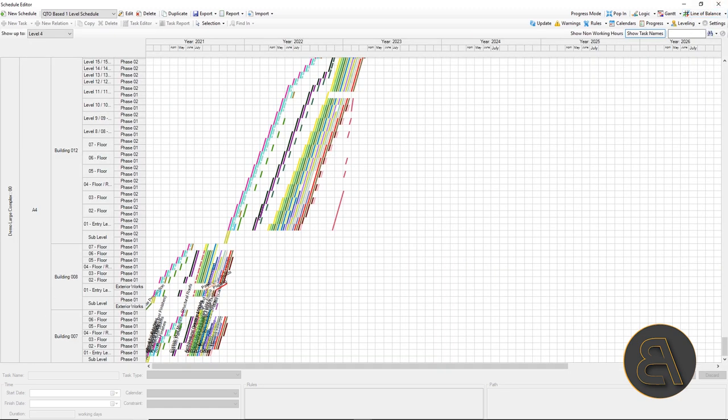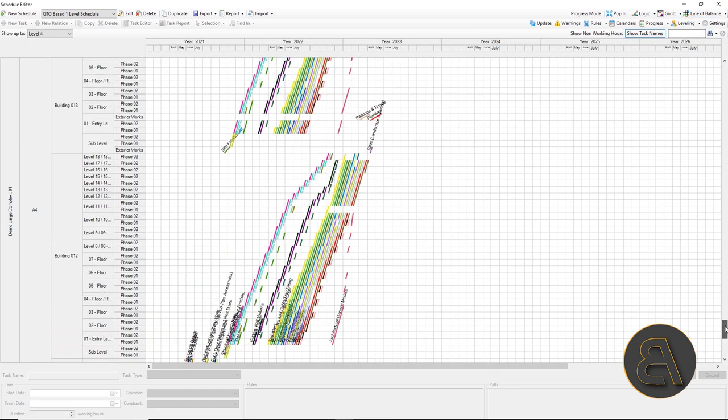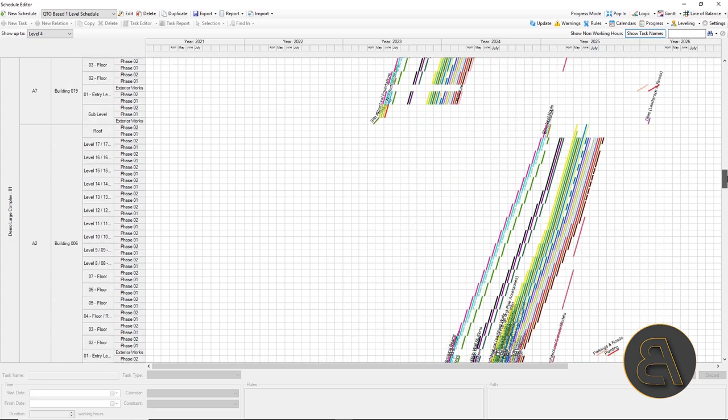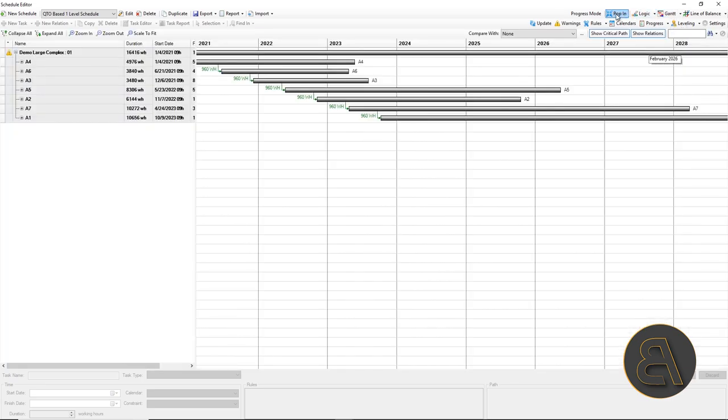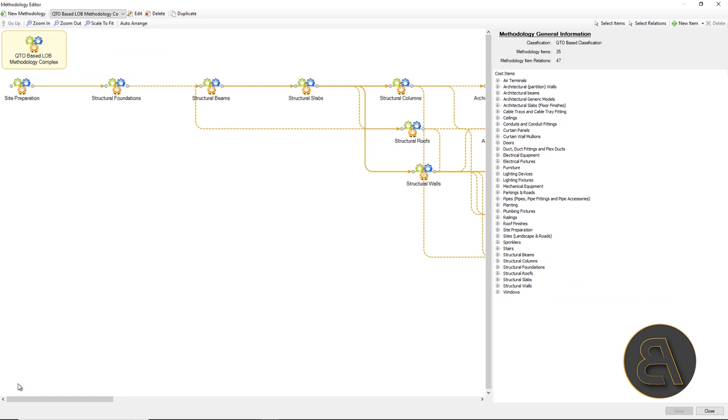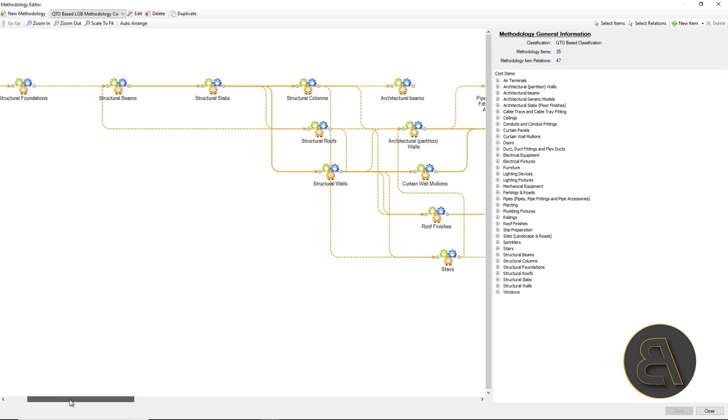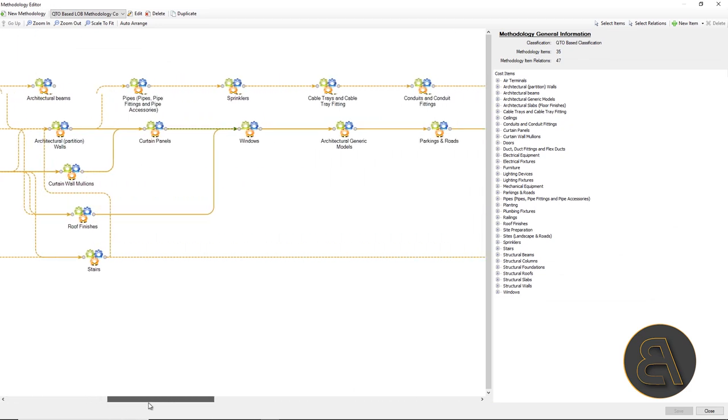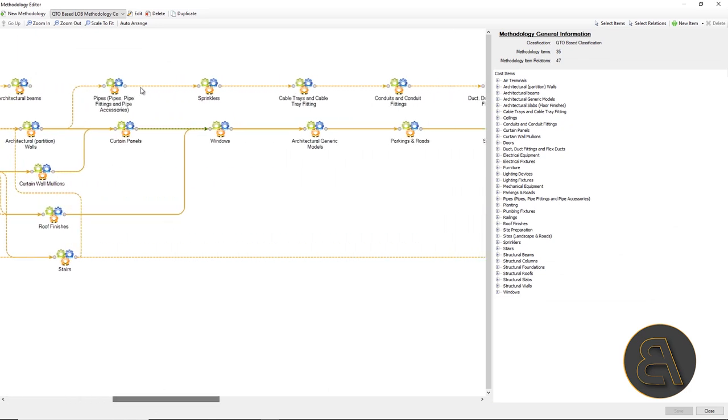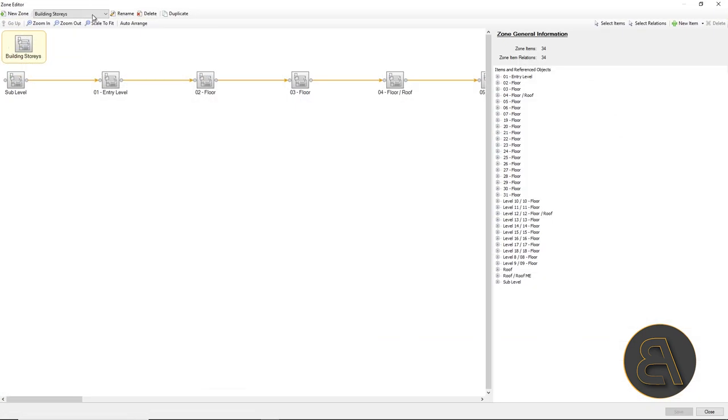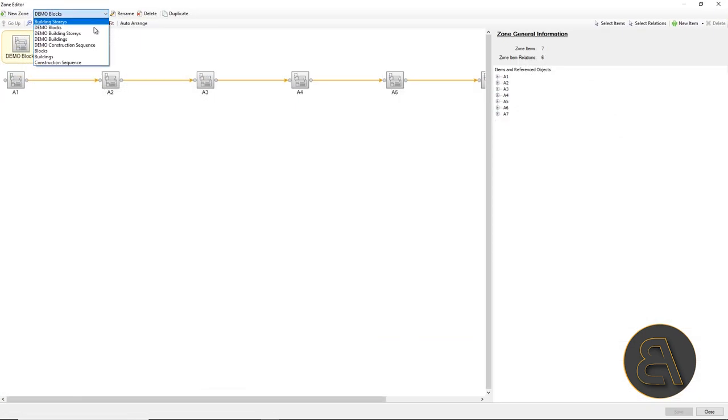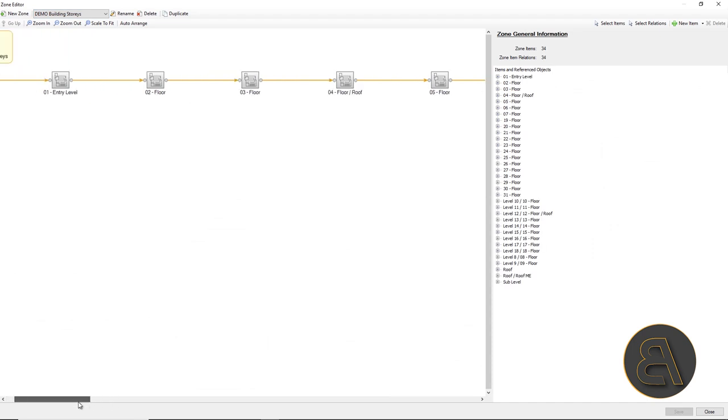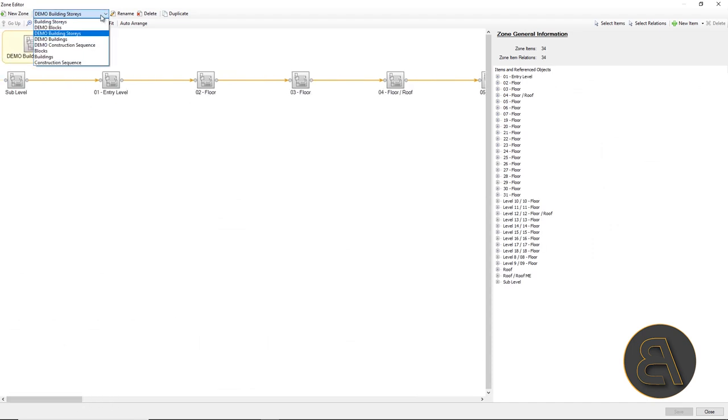Automatically generated relation tasks that can be seen through GANTT and line of balance. Now, for methodology, the construction methodology was defined by a logical connection between different types of project works obtained from automatically generated cost structure using categories of elements from Revit.